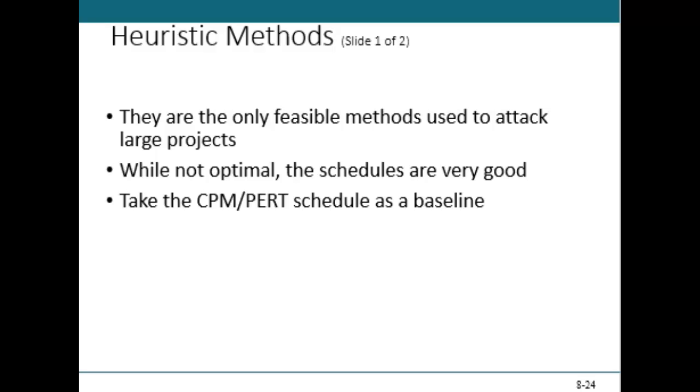So another thing that we can do here, in response to the complexity of scheduling in this environment, is use computer programs that schedule job assignments using pre-programmed heuristics, or these rules of thumb, to resolve resource conflicts. One of the more effective of these is called MINSLK, which is minimal total slack, right? Really tightening down your schedule, minimizing the slack.